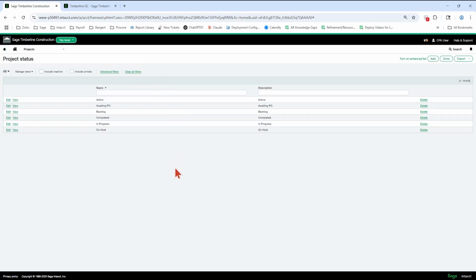So you are wanting to close the job out at the end of June, for example. You want to then warn your staff that code cost to that job that, hey, it's getting closed out. We don't need any more time to go there. Please code the time somewhere else. So that's kind of the purpose of those.